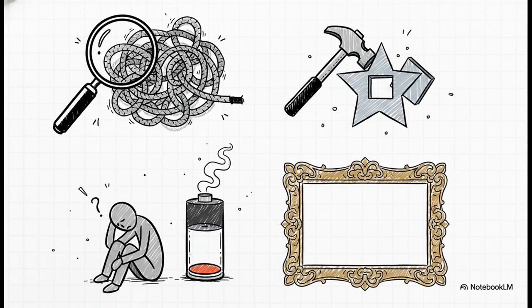Number 1, classifying complex as complicated. Human nature loves the false safety of analysis. Complex feels deeply uncomfortable, so we pretend we can analyze our way out of it. Listen, if an expert can't guarantee the outcome, it's complex. Full stop. Number 2, skipping the confused domain entirely just to force a single classification. If your stakeholders disagree on the domain, decompose the project first.